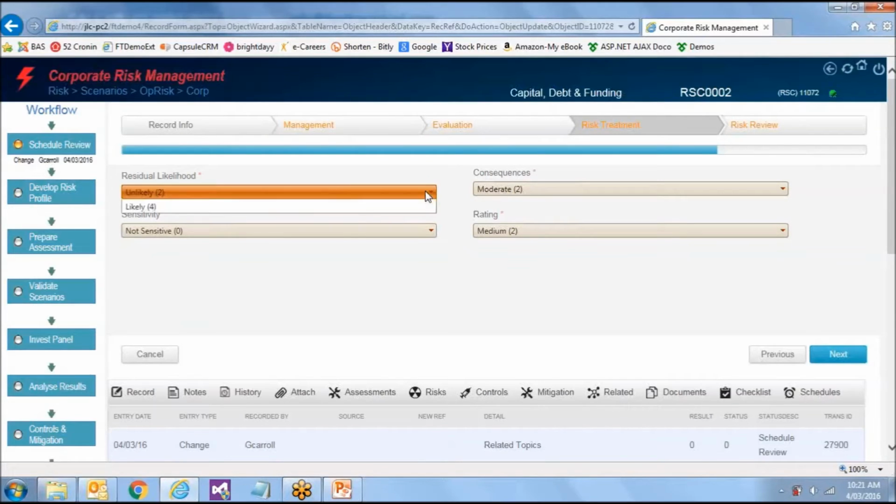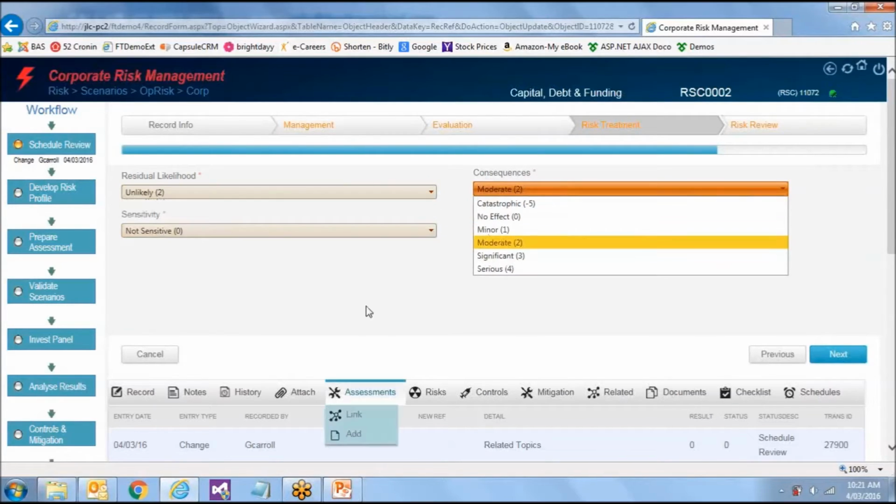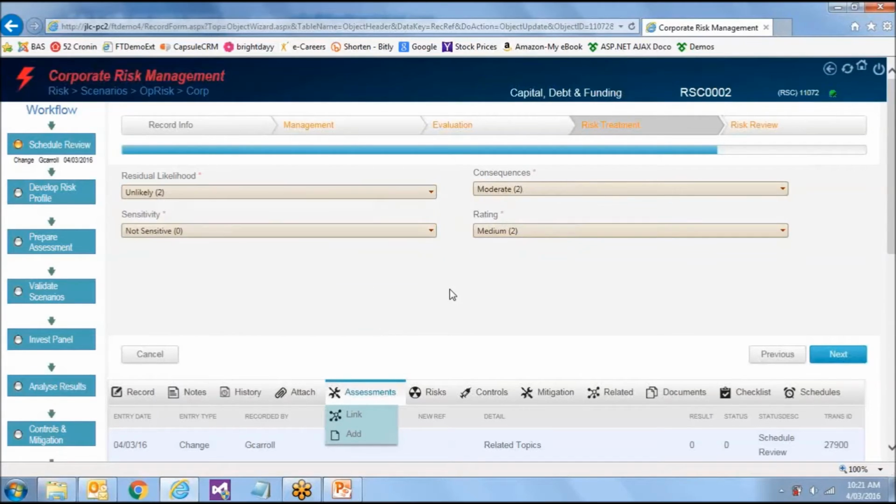You've got your normal likelihood and consequences, whether it's a 5x5 or a 10x10 or whatever else, that's all again controllable by you, what goes into them, and therefore risk matrices. We can actually have a different risk matrix used in each of the libraries. So finance can have one type of matrix, operations can have another, and engineering can have another. So you can suit it to the technique, but obviously all coming back to a common rating system.